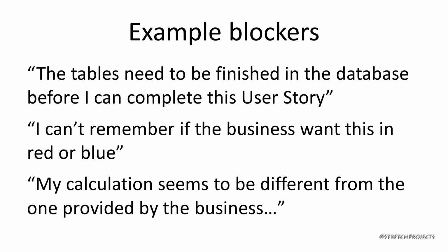And this is also where having the product owner on hand is really useful. Some of the questions that will need answering will stop the developers from actually completing their work, and they will likely say so when answering this question. If the product owner is on hand and able to provide the answers to those questions immediately, the entire process to resolve that issue goes away, and the developer is able to get on and do their work. If any of these, what are called blockers, are identified which cannot be resolved during that meeting, it's the responsibility of both the developer and the project manager to go away and resolve it.